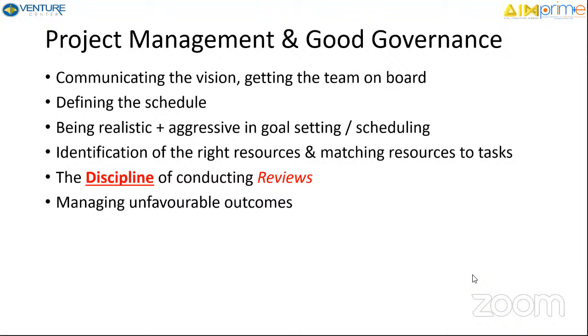in project management is to get the entire team together once every week for a project status review. And every single person has to report on not only what was supposed to get completed in the last 5 to 6 days, but also on the status of what is at risk of the things that are going to get completed in the next 7 to 15 days.